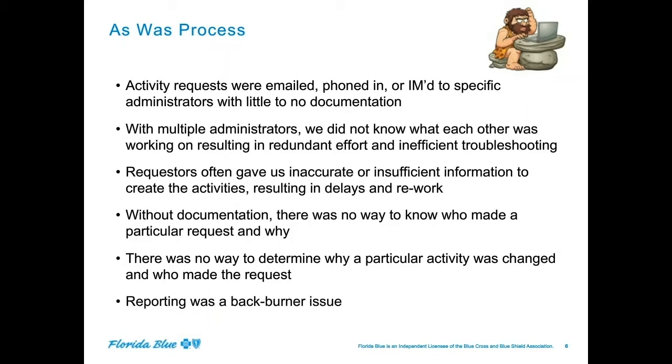And then one of the ones that I really got involved in early on in my administrative career here was reporting. Reporting was always an afterthought with our implementation. And it was something that always caught us at the 11th hour when somebody would put together this big complex curriculum or some other course. It would go out there and it's just about rolled out to production, and then all of a sudden they say, "Oh, well, the business stakeholder needs to see these reports." It's like, okay, well, it might take us 2 weeks to build some of these reports, so you probably should have talked to us about that earlier.